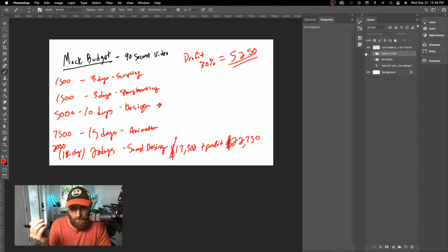If you're newer to this and somebody says, hey, I need a 2-minute video, and you're like, I don't really know how long that would take, you may have to give them a scope of work to say, look, here's what I think it's going to take. And on some of those first projects, you may just have to commit to a price and then learn the hard way, right? Like if you didn't charge enough, you're going to have to remember next time, hey, 3 days for scripting just isn't enough.